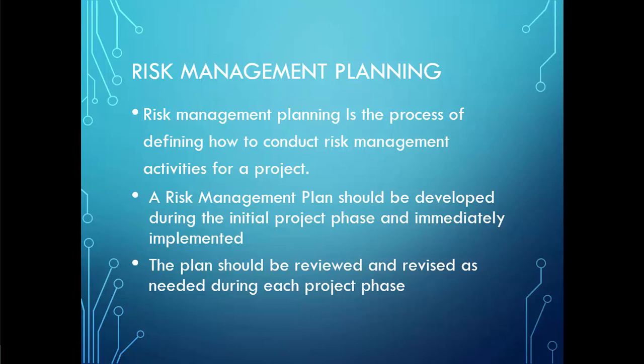To plan for risk, all information gathered will be needed and used, such as the work breakdown structure, the resource breakdown structure, and the responsibility matrix. In addition, the planning team will use the project scope to understand project boundaries and constraints.